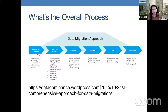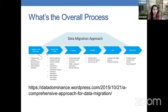This screen shows the overall approach for a data migration project. We have six phases at a high level: we first do analysis and discovery, we extract and profile, we cleanse, we validate, we load, and then we reconcile. These are the general steps and things that happen in each of the phases. You can read the full article in depth on your own time, but just as an overall process, we're talking about either moving data or merging data.